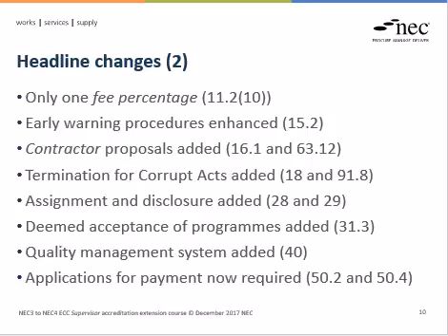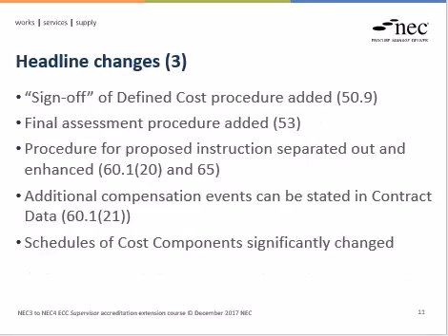There's a new and quite important deemed acceptance for programs that has now been added into clause 31. A quality management system has been added in clause 40. And there's now a requirement that contractors provide applications for payment. We will again look at this one in particular later on in the sessions.